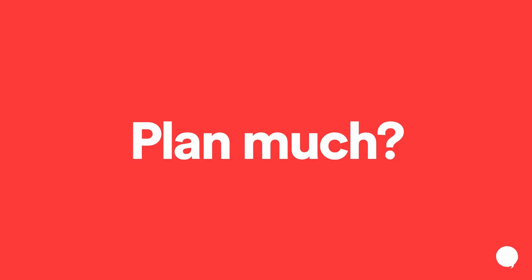So it's really important. I'm a real believer in Agile methodology, but you need to make sure that you plan, but don't plan too much, right? One of the ways that we did that with the Rainforest Alliance is we did a collaborative backlog building with them. Is anybody familiar with Scrum terminology? Who's familiar with Scrum? In Scrum, you have some roles like a product owner and a Scrum Master, and the project will have a backlog of basically, here's what we want to do. And so you figure out, what are all the things in my backlog that I want to do?